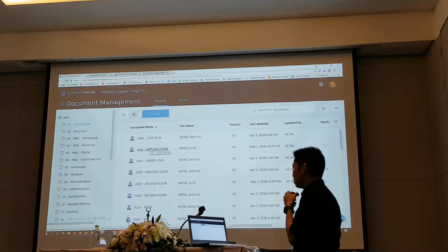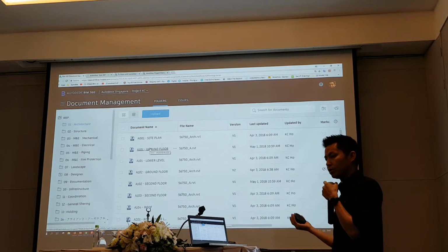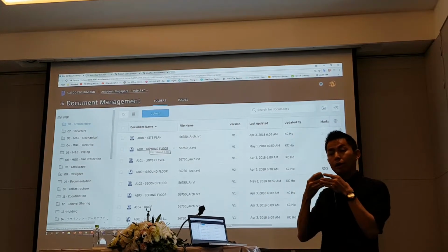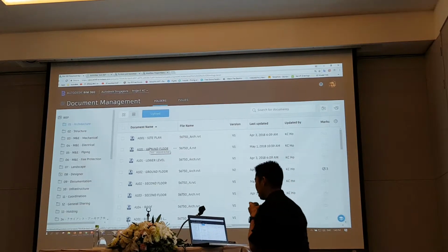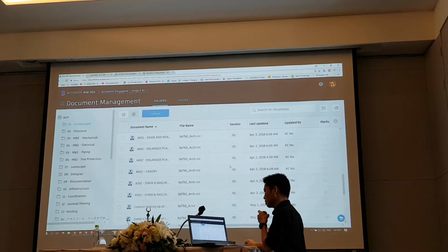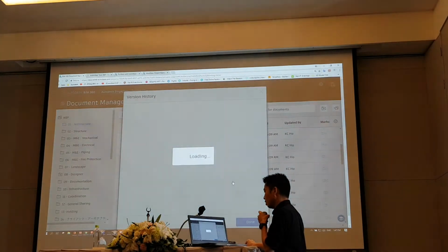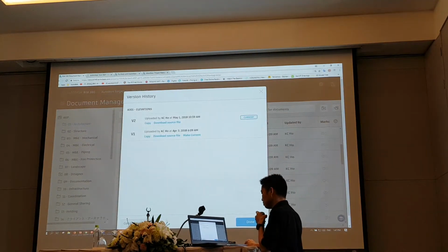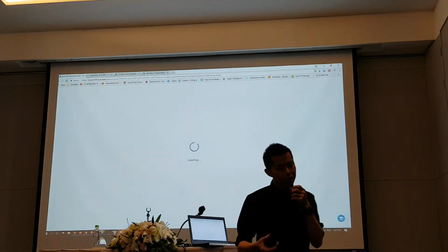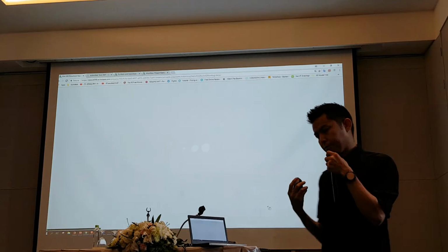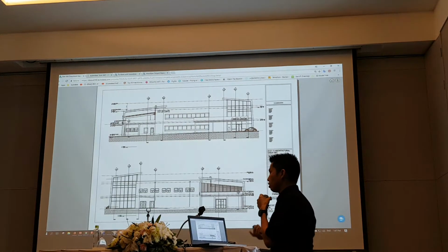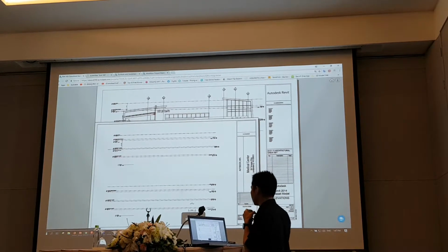If you are an existing Doc user, you know that last time we just did overlapping, side-by-side comparison on the 2D. But nowadays, it gives you a summary or report just like in BIM 360. It checks three things: added new, modified, and deleted, by color code. I think it is green, yellow, and red, if I'm not mistaken.